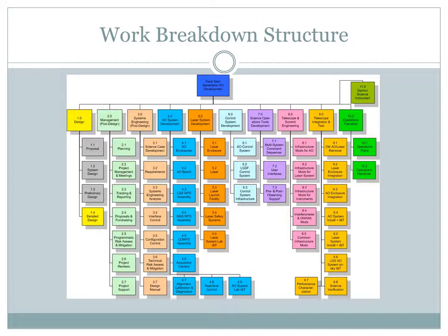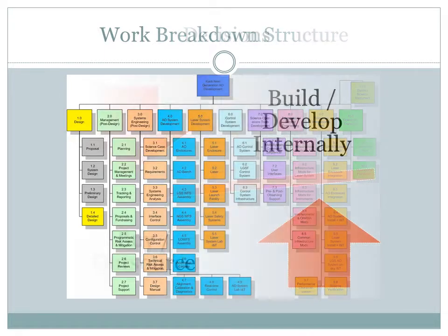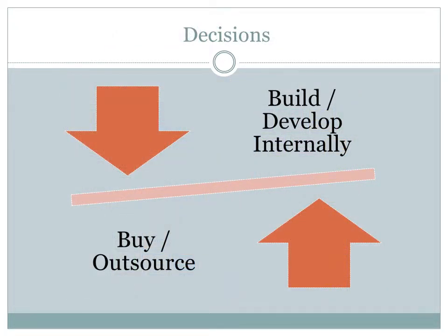Although the work breakdown structure is typically utilized to identify deliverables, you may uncover multiple options with your project team where a decision is needed in order to move forward. An example of a decision you may encounter might be whether or not to develop functionality in-house or outsource to a third party that already offers a solution.